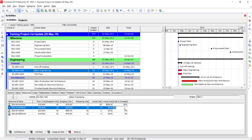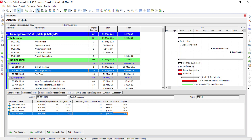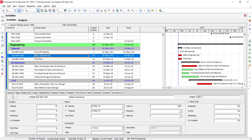I am entering the progress of this activity as 95%. It will automatically calculate the Earned Units — Earned Units means actual units. If I go to the Status tab, you can see that this activity is 95% complete. Additionally, you need to go to the Status tab and give the remaining duration. Suppose 95% is complete and you think the remaining 5% will take 3 more days — I am putting 3 days here. The Actual Duration field shows zero because we have not yet rescheduled.